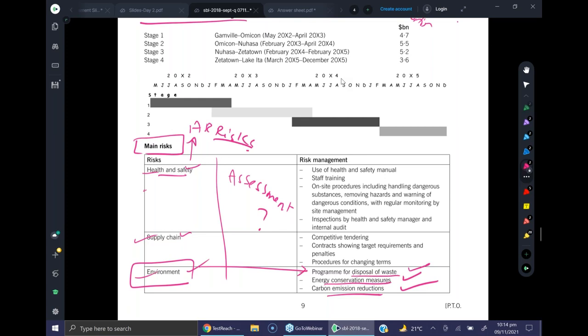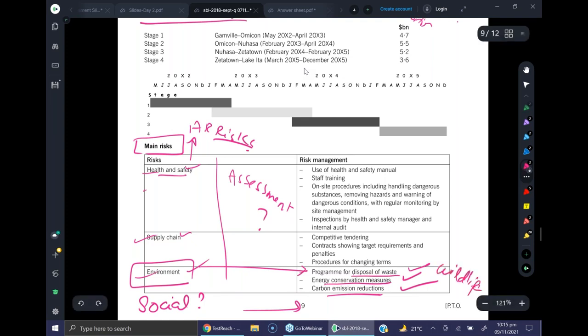So there might be some more specific risk assessment and risk management measures mentioned? And also, do you think a social risk needs to be added here? The effect on communities when we build the road, how they will be impacted, and the environmental risk should be talking about the impact on environment, the wildlife. Yeah, that is also not mentioned. So we are kind of giving the feedback like a senior and just highlighting and recommending what needs to be added.